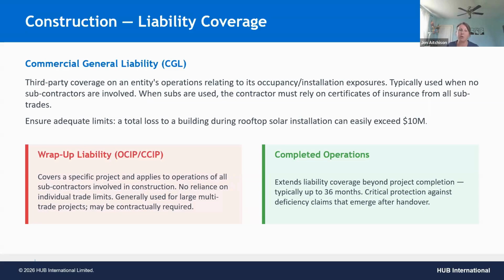Making sure there's adequate limits as well on those commercial general liability policies is really key. It shouldn't reflect the work being done and the cost of the work being done. This is something we see often, where folks will try and size a limit of liability based on their fees or based on their percentage of contribution to the work. But the reality is that that limit may not be sufficient. Oftentimes, the cost of the work is completely outsized to the potential exposure for liability.